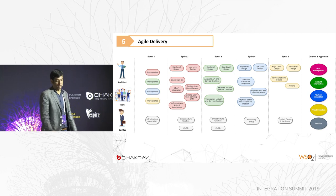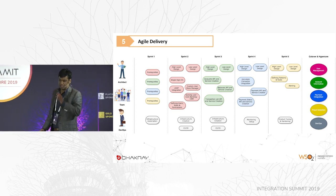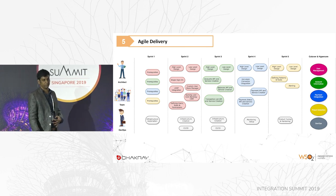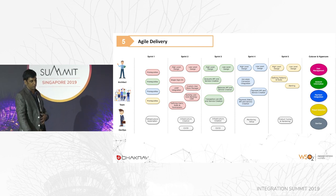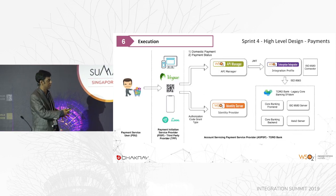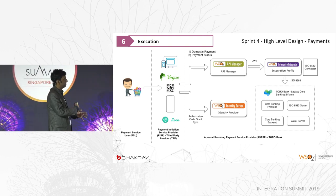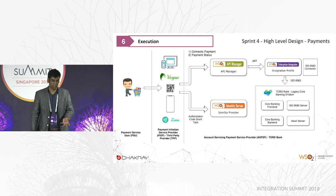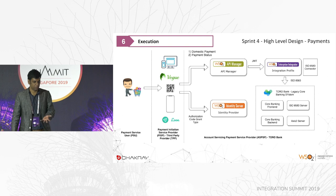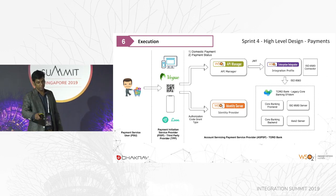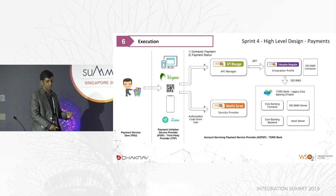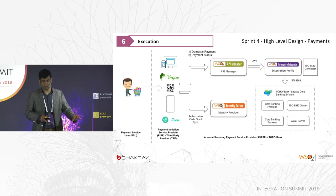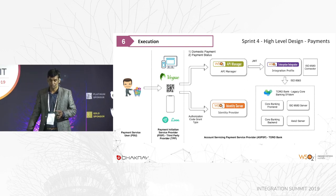The CIO's requirement was to deliver within three months — this is proven and we have done it on many occasions. Sprint one is a prerequisite sprint. Sprint two is user management, sprint three is accounts, sprint four is payments, sprint five is fraud detection, followed by cutover and hypercare where the platform is handed to the support or managed services team. The DevOps epic runs in parallel throughout all sprints. That is the basic sprint structure.